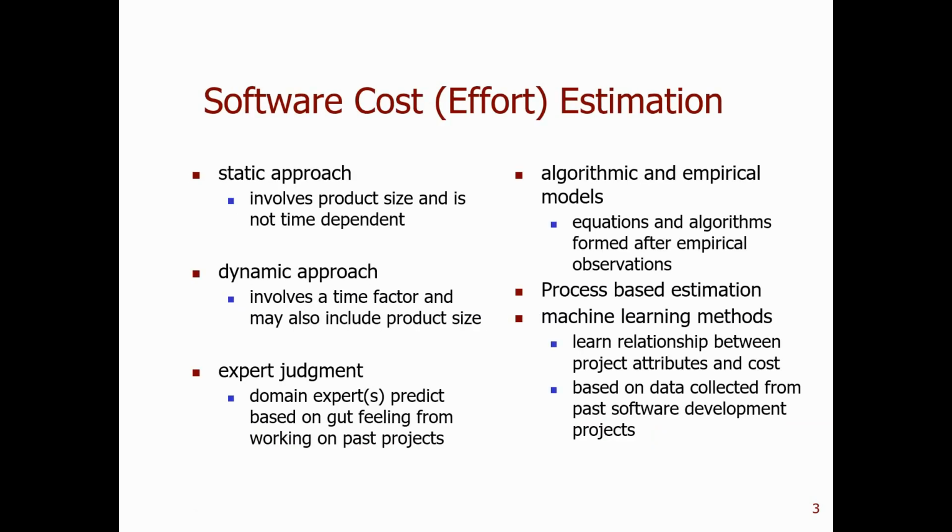So, talking about the ways we can do the cost estimation. The first one is a static approach, and this is one of the most commonly used because it only involves product size. We don't consider other aspects. Like the time is not involved, only the size. So the logic behind it is the larger the size, the more cost of the software.